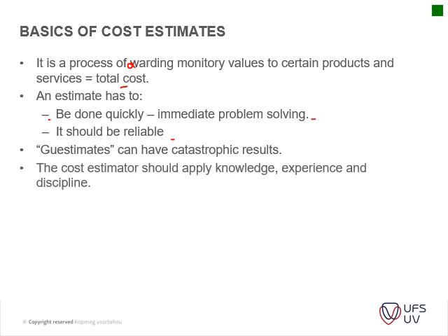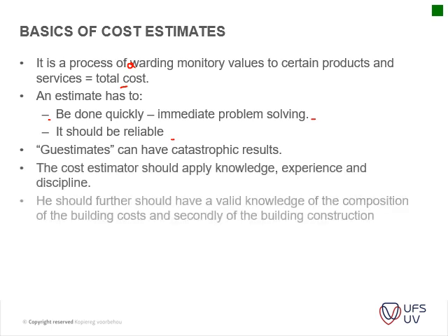The cost estimator should apply knowledge, experience, and discipline. He should further have a valid knowledge of the composition of a building. Basically, he just needs to understand that if you take out this wall, it might not necessarily save money, because now you suddenly have to put in structural reinforcing in the ceiling to open up this space. So that's the basics that the cost estimator has to look at.